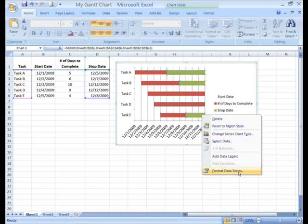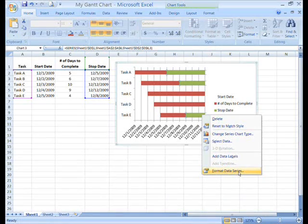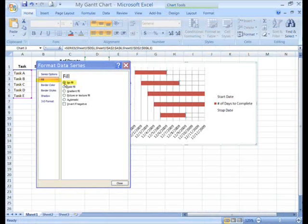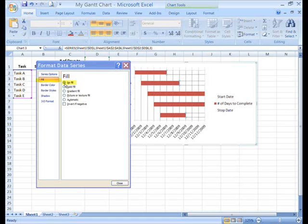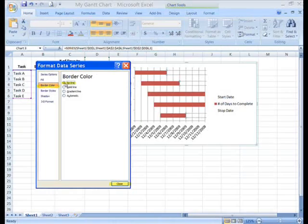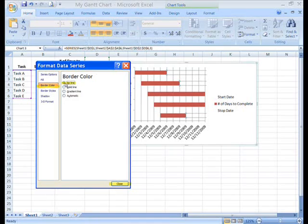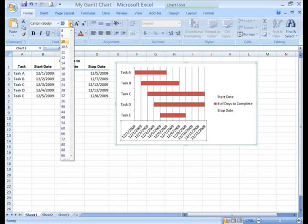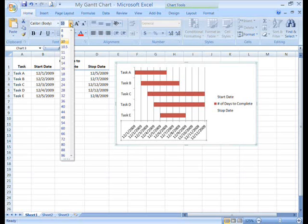Now click on the farthest right portion of any of the bars to select them all. Right click on them and select format data series. On the left side of the dialog box, click on fill. Then on the right, under fill, click the tiny circle next to no fill. On the left side of the dialog box, click border color. On the right, click inside the circle next to no line. Click the close button. Finally, our chart looks like a Gantt.